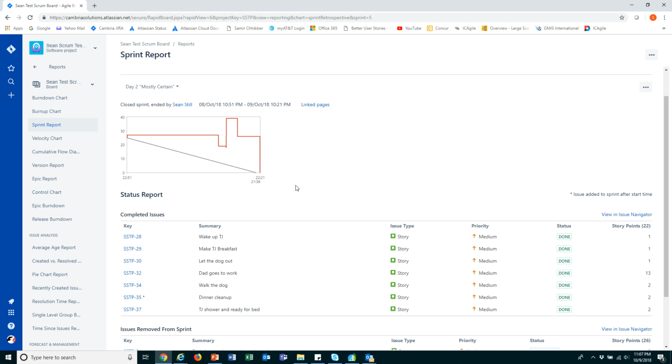Okay, so starting off looking at our burn down chart, you can see that the team had a long stretch where there was very little progress that was made. And then some progress was made as seen in this downturn. But as soon as they get to this point, they suddenly pull in a bunch of additional work, even though they are nowhere near a point where we should be considering that.